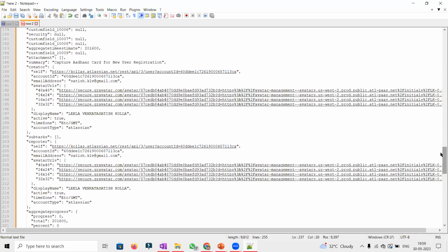The Rally license was pretty expensive. We were paying approximately $670,000 plus for 2,000 licenses. In Rally, we had the description field as a template, meaning the issue description and resolution steps was the template. But when we were migrating all the projects from Rally to JIRA, we were not able to create the template within the description field.